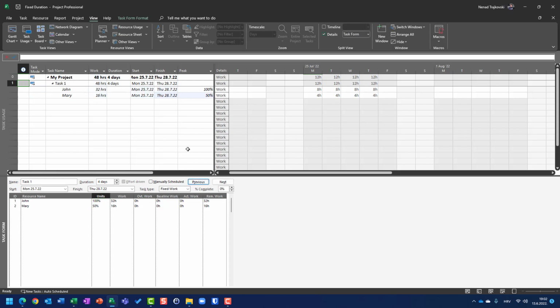But I'm going to change, and I will say, okay, but I want Mary to work 50% per day. Now I have, as I had in my previous examples with fixed units and fixed duration, John and Mary, who are supposed to work John 100%, Mary 50%, and they are going to work 4 days. John 8 hours per day, Mary 4 hours per day. Now let's go through my examples.